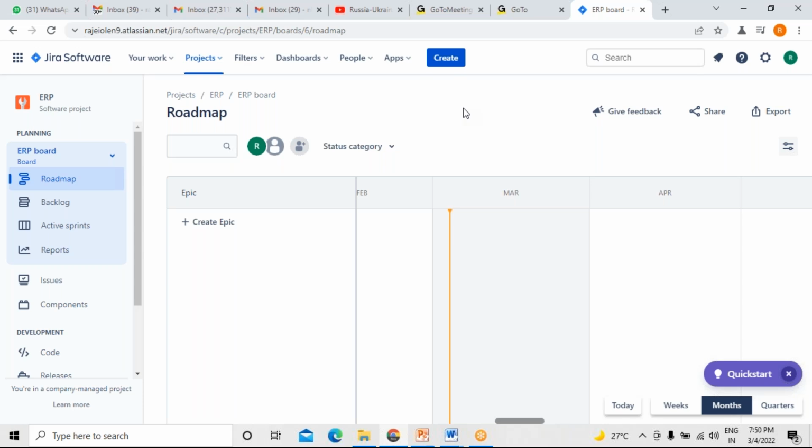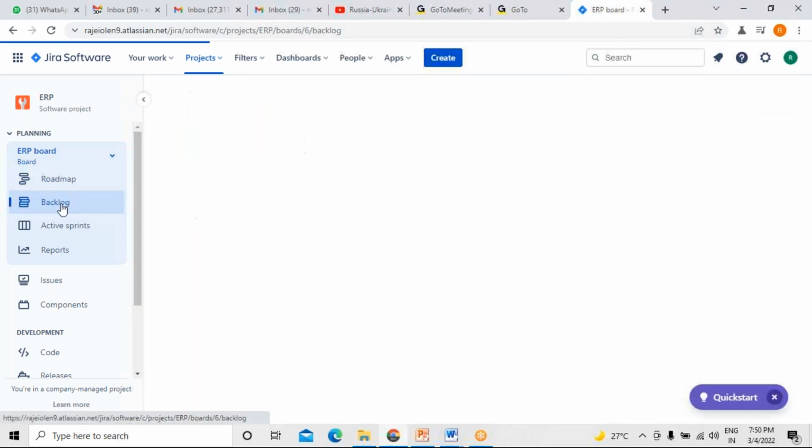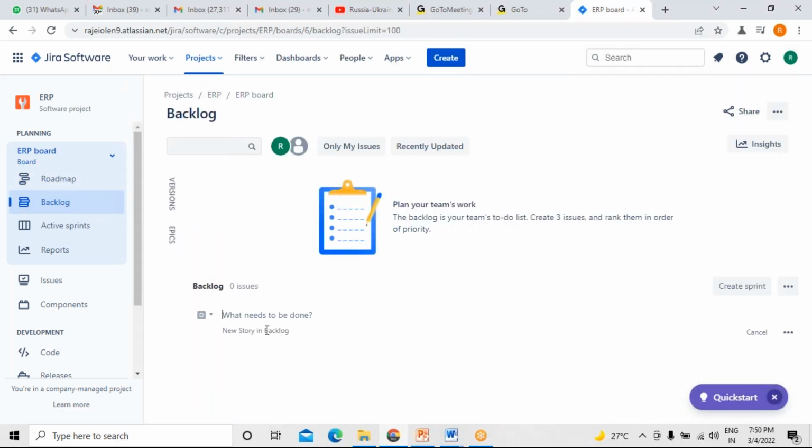After that, the Scrum Master comes into the picture. So during this phase, the Scrum Master is nowhere involved, right? The Scrum Master won't be involved here. Once the epic is created, whenever the backlog comes into the picture, you will be seeing all the items. In the backlog, you can see all the items. From here onwards, you are doing sprint planning. From there, the Scrum Master comes into the picture. Do you understand now? Yes.